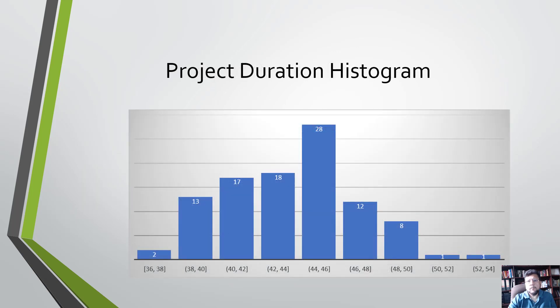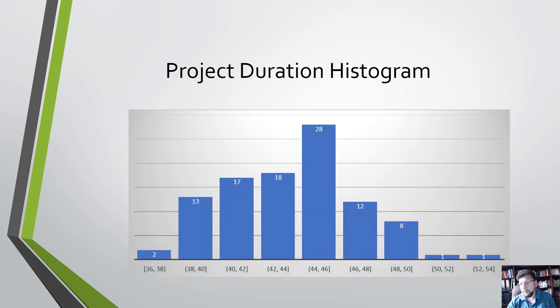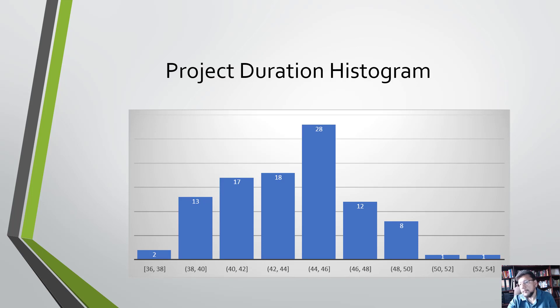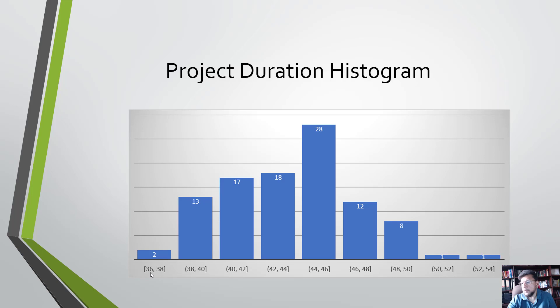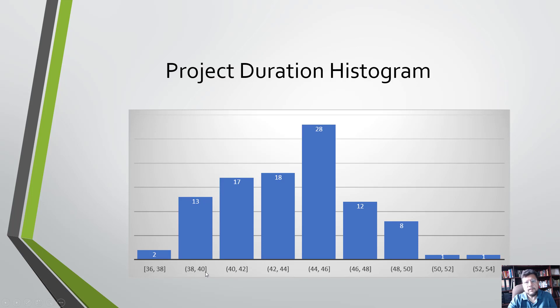Now it comes to using this data. The way we use this data is that we prepare a histogram. In this histogram, you can see that I have ranges and a percentage. So the percentage chance of 36 to 38 days is 2 percent. The percentage chance for 38 to 40 days is 13 percent.